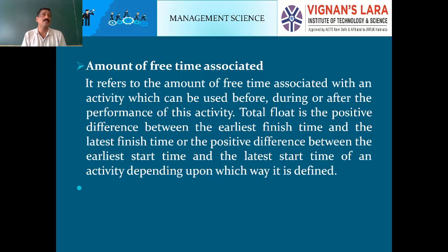Why? Because delay is harmful to the project completion. That is, it refers to the amount of free time associated with an activity which can be used before, during or after the performance of this activity. Total float is the positive difference between the earliest finishing time and the latest finishing time, or the positive difference between the earliest starting time and the latest starting time of an activity, depending on which way it is defined.